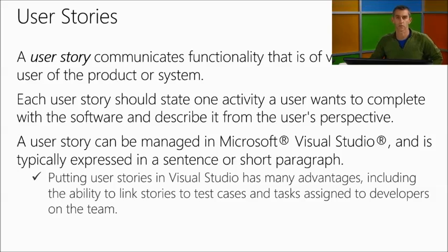That's right. That's just part of Visual Studio, and it's really handy. You can get those user stories right into Visual Studio. You can have your test tasks associated right to those user stories, and your test cases are associated to your tasks. So everything is traceable back both directions, so you can see how your user story is being tested, and you can validate if a user story even changes down the road. You can very easily trace back and figure out what test cases does this affect, what test cases do I need to change, or what test cases do I need to rerun. And that's all handled in Visual Studio.